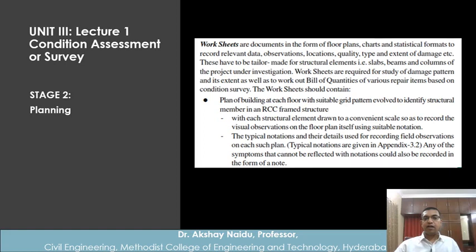Worksheets are documents in the form of flow plans, charts, statistical formats to record relevant data, observations, locations, quality, type and extent of damage. So these have to be tailor-made for structural elements, that is slabs, beams and columns for the projects under investigation. Worksheets are required for study of damage pattern and its extent, as well as to work out bill of quantities of various repair items based on condition survey. The worksheet, so very important.